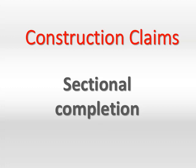Employers and contractors often run into difficulties where the employer has chosen to incorporate sectional completion into the contract. Where a project is split into sections, any extensions of time must be given in respect of the particular section affected by the delaying event. A common problem occurs where a sectional completion supplement has been properly used, but two or more of the sections are interdependent.